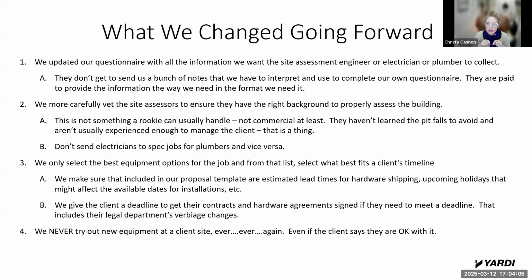Because what they were doing was just writing their own notes, sending those to us, and then we'd have to try to take that information and put it into our questionnaire, even the more basic one we had previously. That's when we'd find out they didn't look at everything. They didn't collect all the data that was in the questionnaire, but we don't find that out until they've left the site, because they didn't fill out the questionnaire, which is what they were paid to do. So we weren't really forcing them to follow the project spec, and now we do. So that helps things as well.